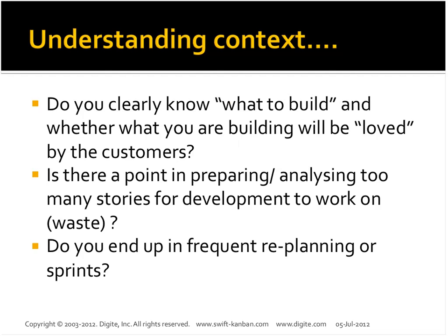Another context is a new startup which is struggling to find out what to build. For them, fixing an iteration scope becomes very challenging because the market dynamics keep changing. Too much time goes into analyzing and planning all the stories together, and it throws off the dev capacity they can utilize. You also end up in frequent replanning. If you don't know what to build next, and don't have a fixed roadmap, sticking to iteration scope becomes a challenge for the team.